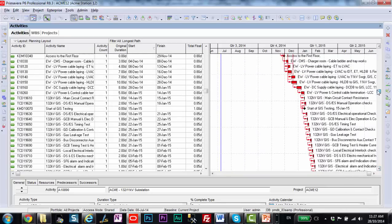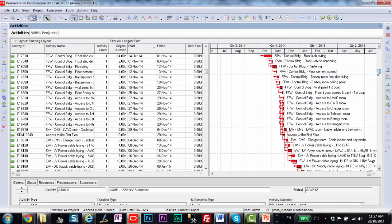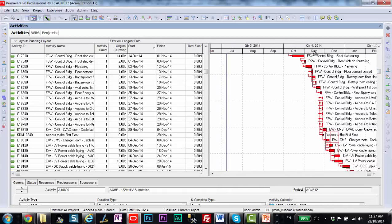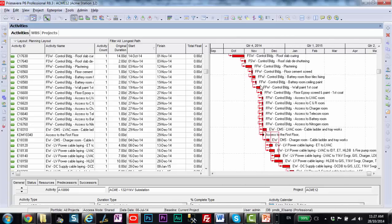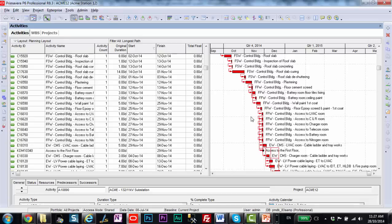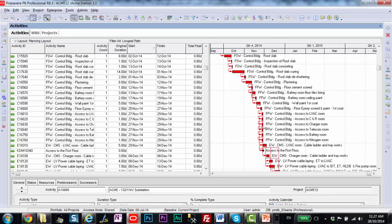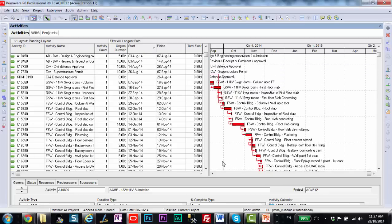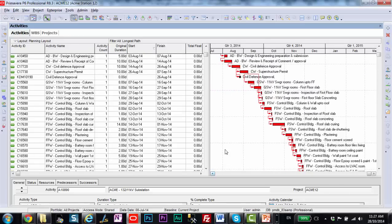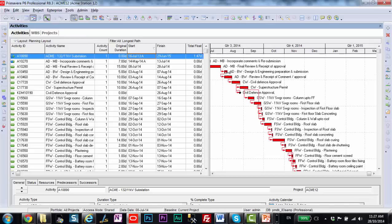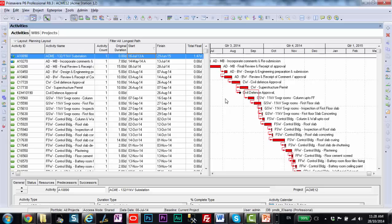Now what I want to look for is areas where I have overlapping activities. Now here's a particular area here. I have lots of overlapping activities. I'll zoom in a little bit. So you can see that this isn't necessarily a dissection with multiple critical paths. But for any place where I have activities that are overlapping, starting those activities on time, each one of them, and ending them on time, each one of them, adds a higher element of risk to my project. They all need to start on time and they all need to finish on time. I've really multiplied my risk by six here because I have all of these activities overlapping at the same time. And if we scroll up, we can probably find another example of that. Again up here, two activities that are going on at the same time that are on the critical path. So having a look at your critical path in this sort of view can help you quickly find the riskiest areas to manage those multiple critical path and overlapping critical path activities.